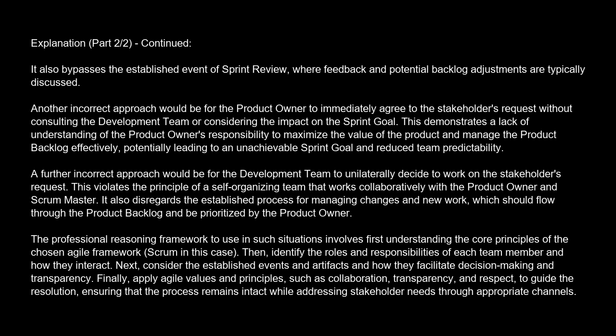A further incorrect approach would be for the development team to unilaterally decide to work on the stakeholder's request. This violates the principle of a self-organizing team that works collaboratively with the product owner and Scrum Master. It also disregards the established process for managing changes and new work, which should flow through the product backlog and be prioritized by the product owner.